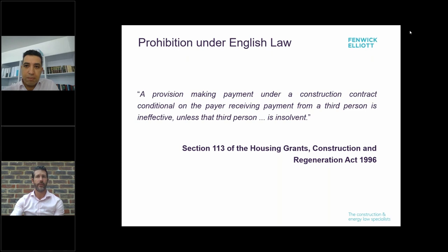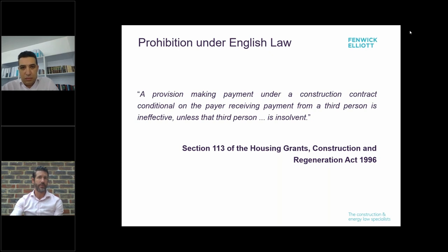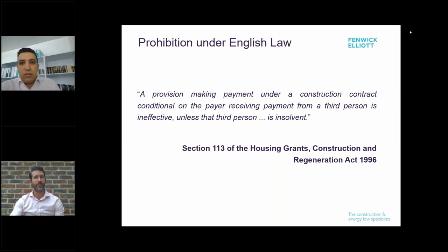In other words, if your contract for construction works performed in England or Britain includes a pay-when-paid provision, it will not have any effect unless the reason for non-payment is the insolvency of the next party up the line. This provision doesn't wipe out the payment provisions in the contract entirely — just the pay-when-paid elements. Subsection 6 of section 113 makes clear that where a pay-when-paid provision is deemed ineffective, any other payment terms agreed between the parties will continue to apply. If there is no clear payment mechanism, the scheme set out in the schedule to the Construction Act will be incorporated into the subcontract to determine how and when payment is made.